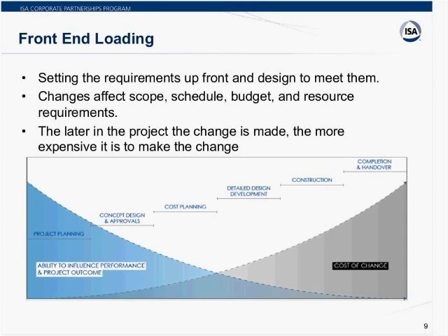And if you've ever had to redo something like graphics or configuration after the construction is mostly complete, and now it's just the control system, the checkout and commissioning is your major task, and you have to start modifying the configuration at that point. I've seen multi-million-dollar, hundreds of million-dollar plants delayed in startup for months for control systems work. So that really reflects poorly on the control engineer. So we've got to make sure that those things are identified as early in the project as possible and can minimize the cost, the impact to the schedule and to the budget if we do that work up front.